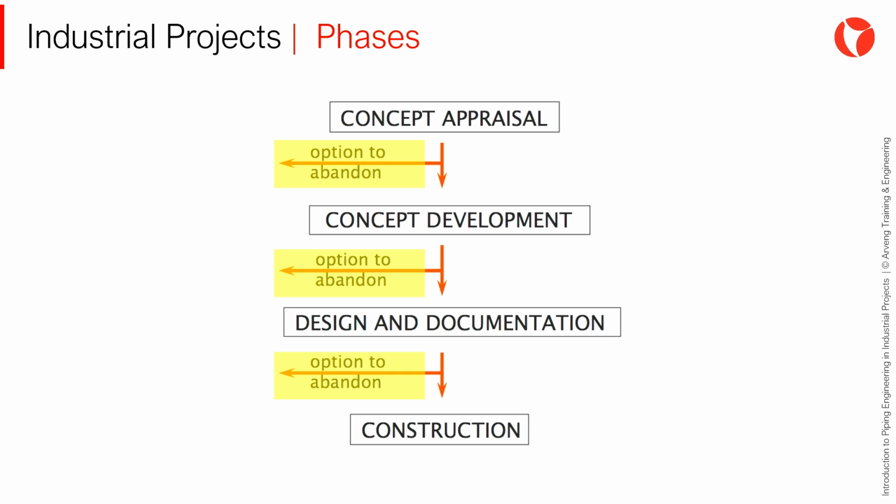It is important to note that these gates are not just review points or project status updates. They are critical decision-making meetings where executives determine whether to proceed or cancel the project and how to prioritize it against some other company's initiatives. Now, let's take a closer look at the content of these phases.